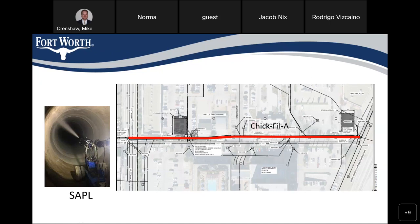And that portion, we actually added a manhole. Some of you might remember a few months back, we had a portion of this area excavated to construct a manhole. There was no manhole between these two ends, and to do this work, we needed to add a manhole, and so that has been done, and that construction is complete, and that's just adjacent to the drive-through of the Wells Fargo Bank, their banking drive-through right there. So that's done and constructed, and we needed that manhole for our city crews' normal typical maintenance and operations, as well as for this project. So that new manhole is constructed and in place. So they will be able to do this spray applied liner between those two locations.